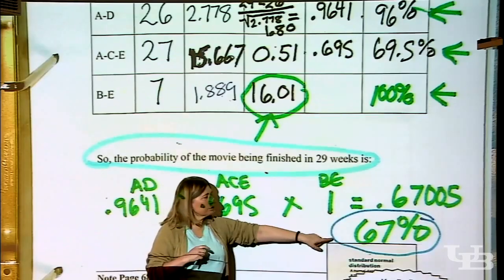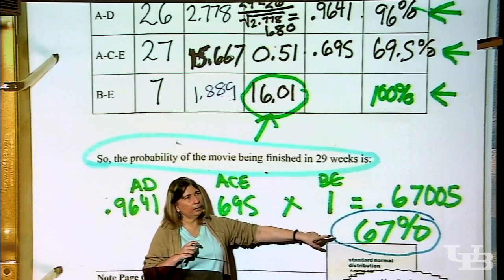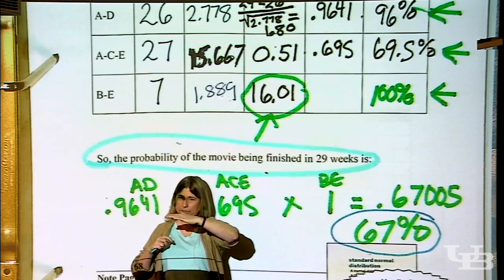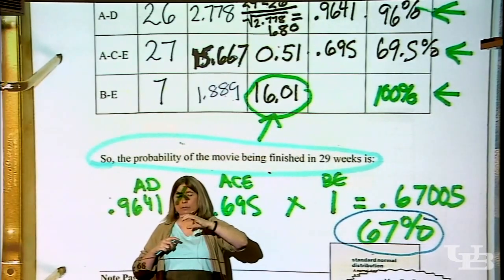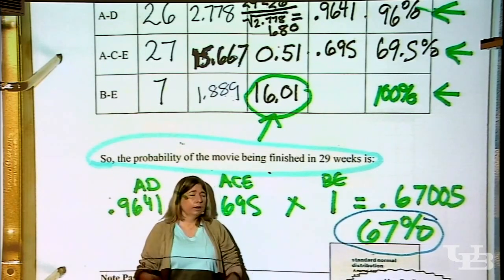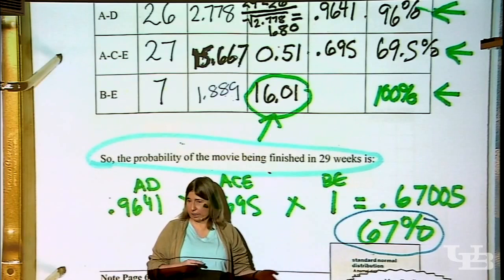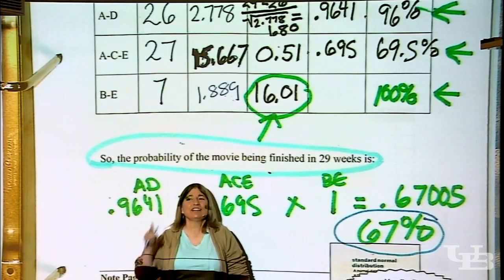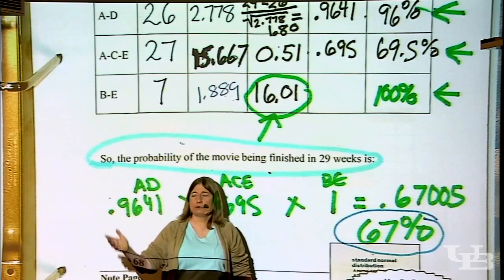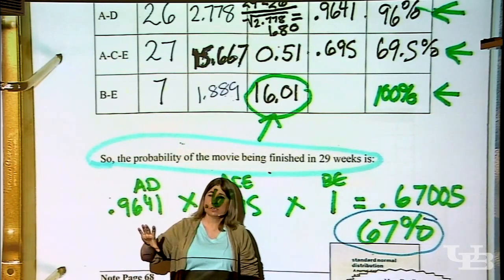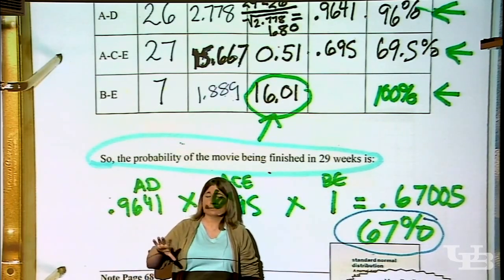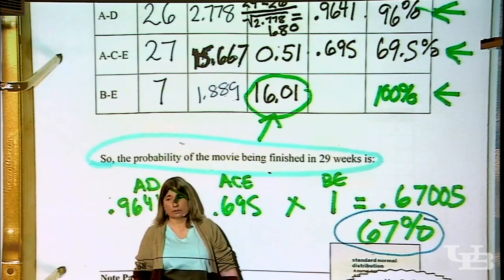This is actually, in reality, an upper limit, so to speak, on the risk. The risk could be more because if something went wrong with one of them, it would affect more than one path. So this is just meant as a quick estimate. This is actually discussed in the textbook. We have to go through a more elaborate procedure. It shows you a simulation instead to explore what the true joint probability is, because the paths are not independent.